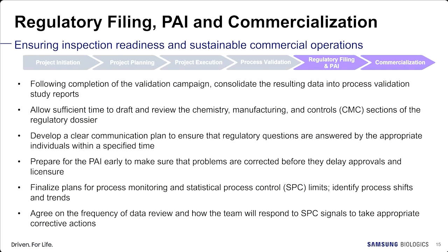highly required. Pre-approval inspection is a part of regulatory approval, so the relevant technology transfer team members prepare for the pre-approval inspection. The technology transfer and process validation, including the issues and their resolution, need to be ready for presentation. Once the product is approved by a regulatory agency, the product moves to the commercialization stage.